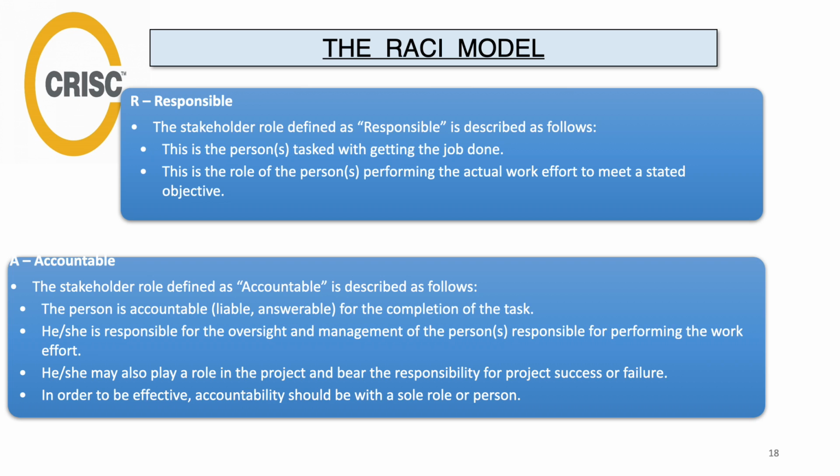These people, often the senior management, are responsible for making sure that the risk management efforts are properly staffed, budgeted, and are being carried out as planned. The one ultimately answerable for the correct and thorough completion of the deliverable or task, the one who ensures the prerequisites of the task are met and who delegates the work to those responsible. In other words, we can say that an accountable must sign off the work that the responsible provides. There must be only one accountable specified for each task or deliverable.